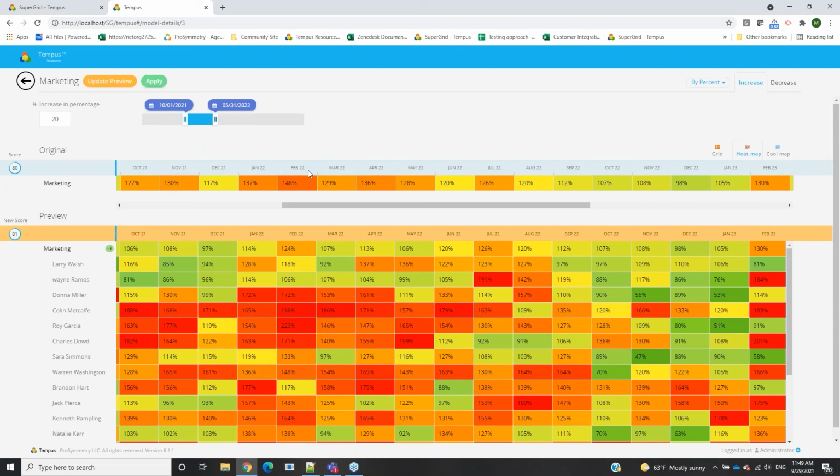And you can see that, as well as you can go in the reverse fashion where maybe we're anticipating this load of projects, or maybe we're anticipating a decrease in this particular department's staff by maybe we're cutting 20%, or maybe we'll be losing these particular resources. You can also run through that scenario and see how that would overall impact your portfolio, and maybe then start adapting to some of those issues.